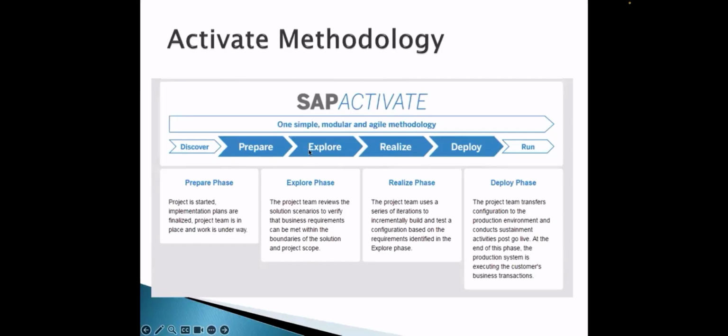The explore phase is where we, as consultants, do the requirement gathering. So the explore phase is all about requirement gathering, guys. To understand the HR requirements of the client, for example, if Coca-Cola is the project, understanding their HR requirements and how we should configure their SuccessFactors system. Second, to understand their existing system, their existing pain areas, and the issues they are facing in their existing process, how we can fix them with SuccessFactors solutions, and how we can suggest better workarounds or better processes.